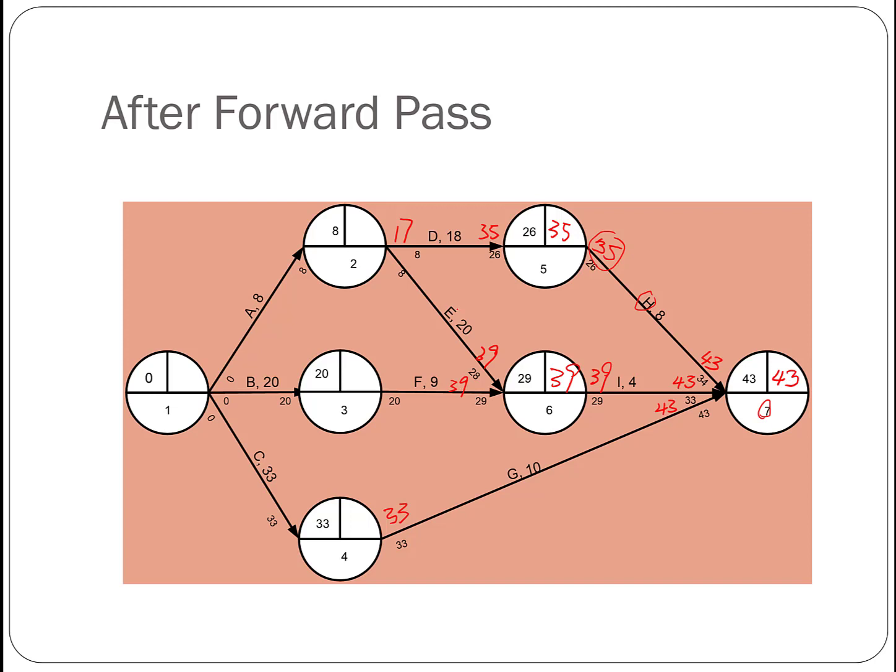And it takes 20 days to complete E, so we can start E no later than day 19, and we are good. We won't delay the project. F will be 30 here. Okay, now we're going to look at node 2.